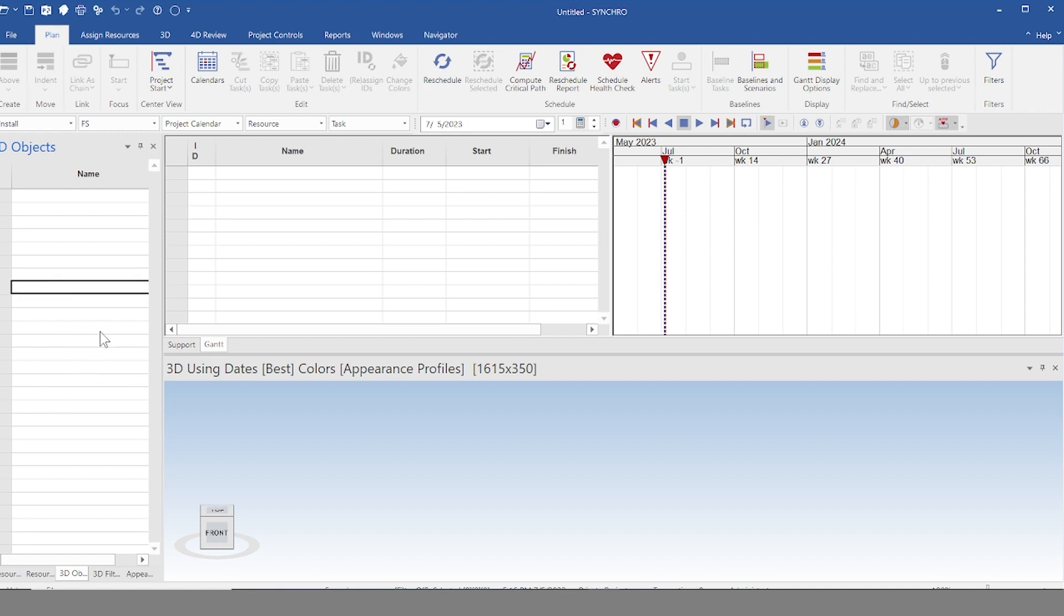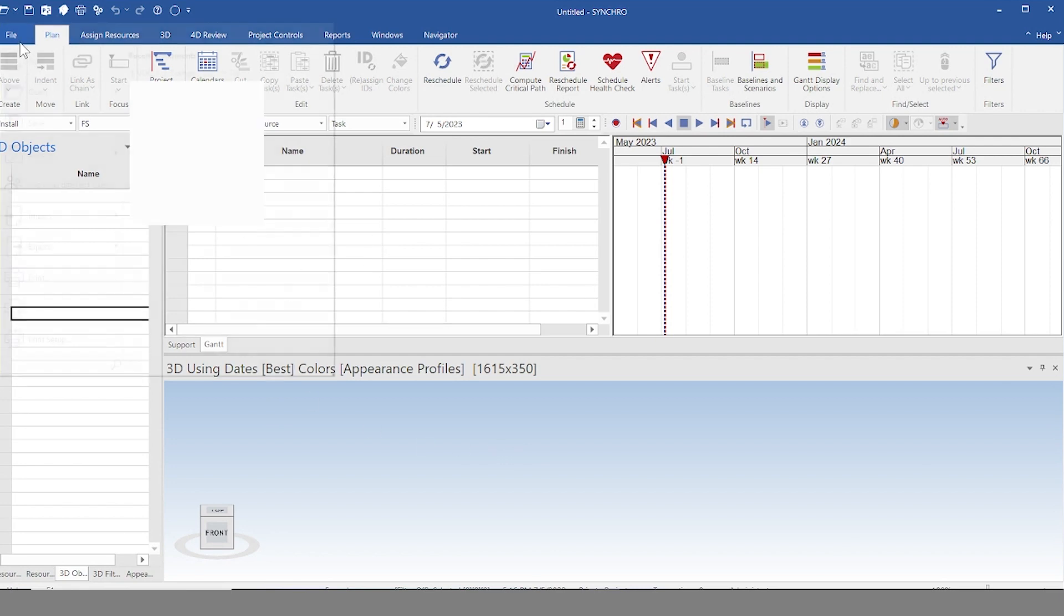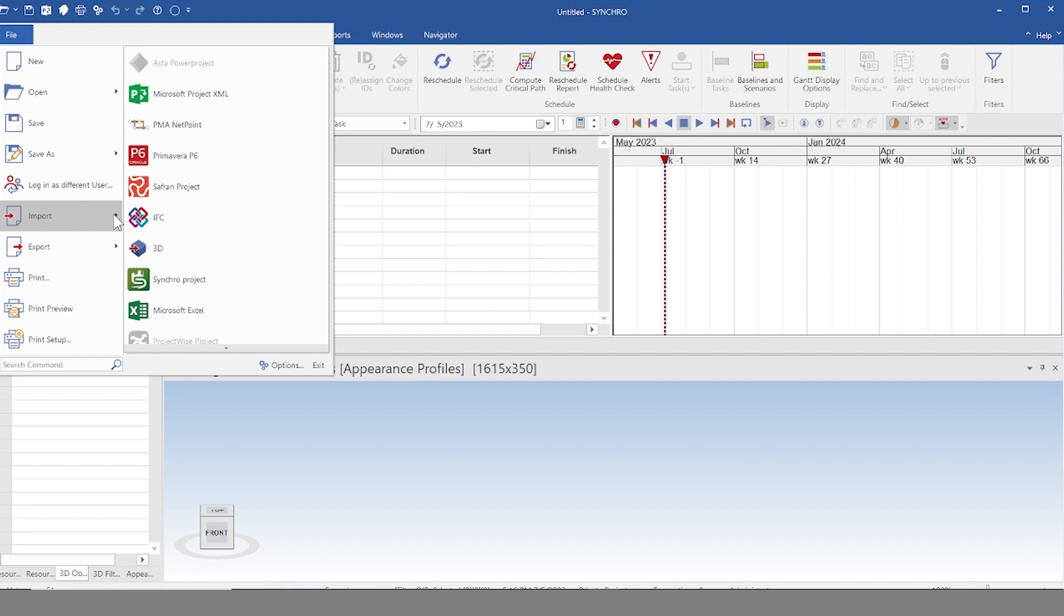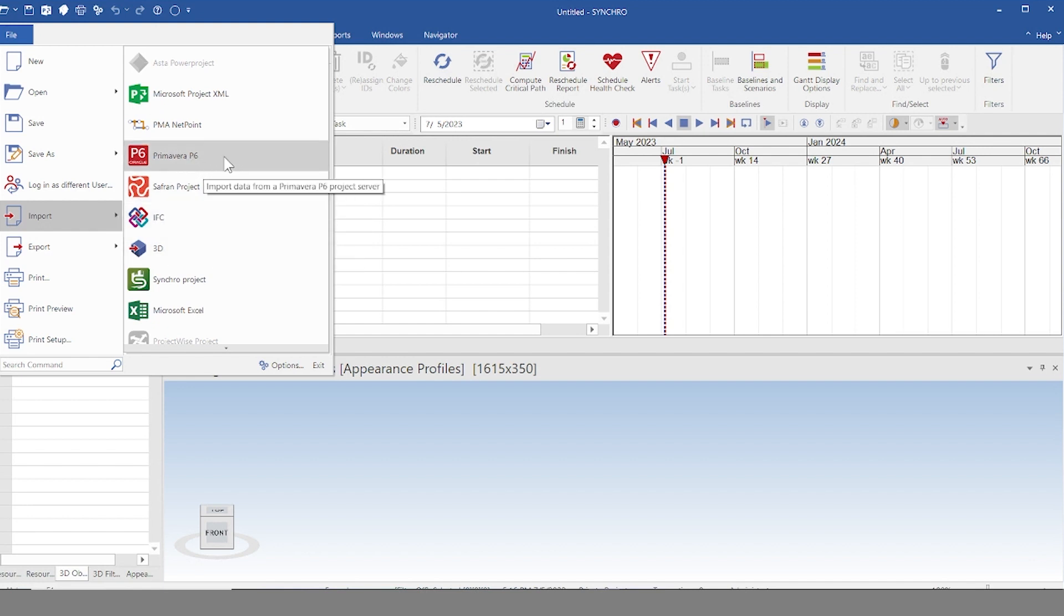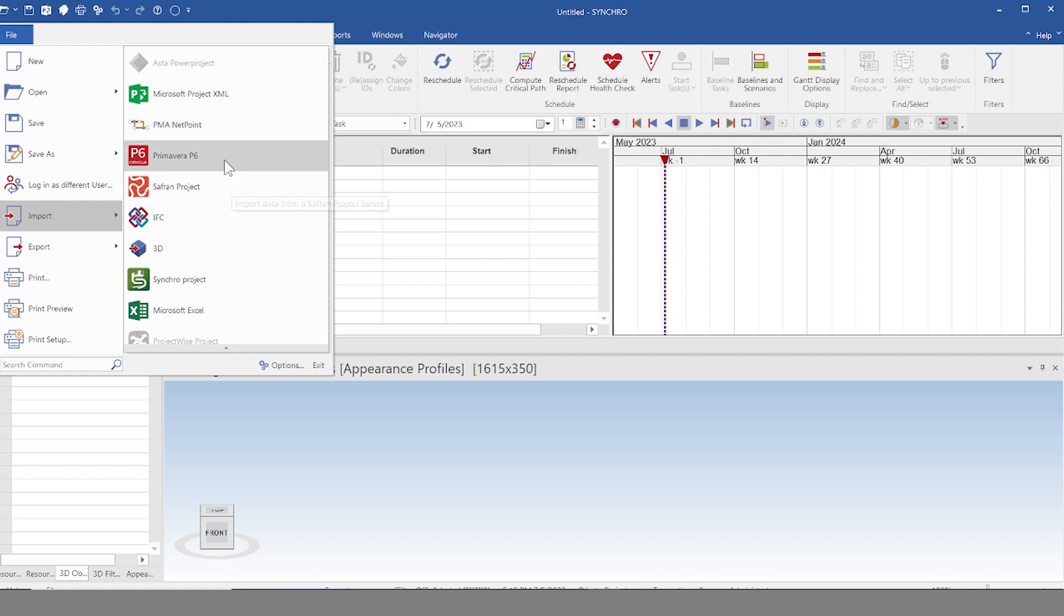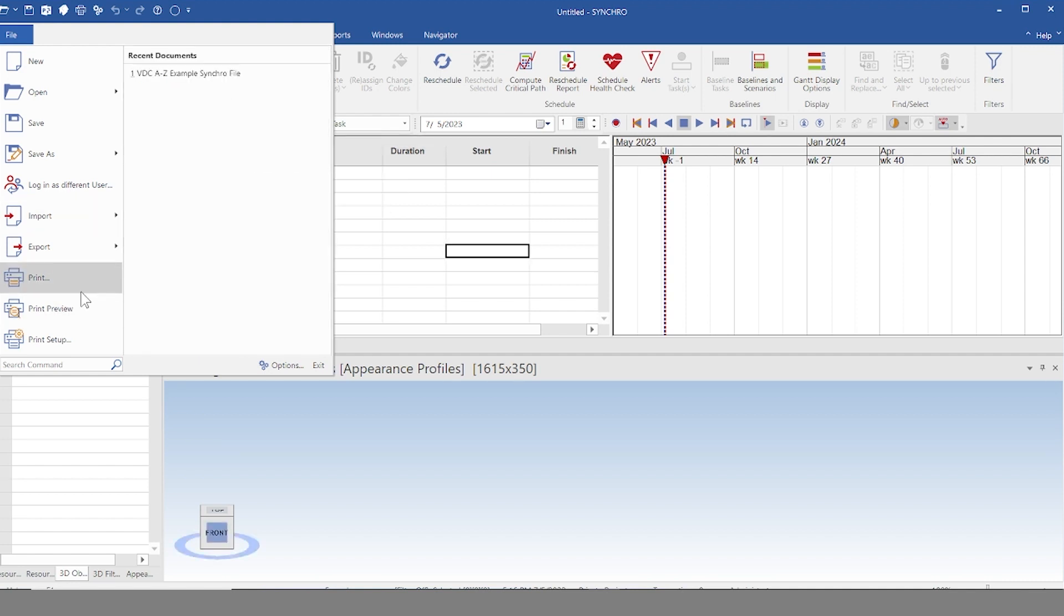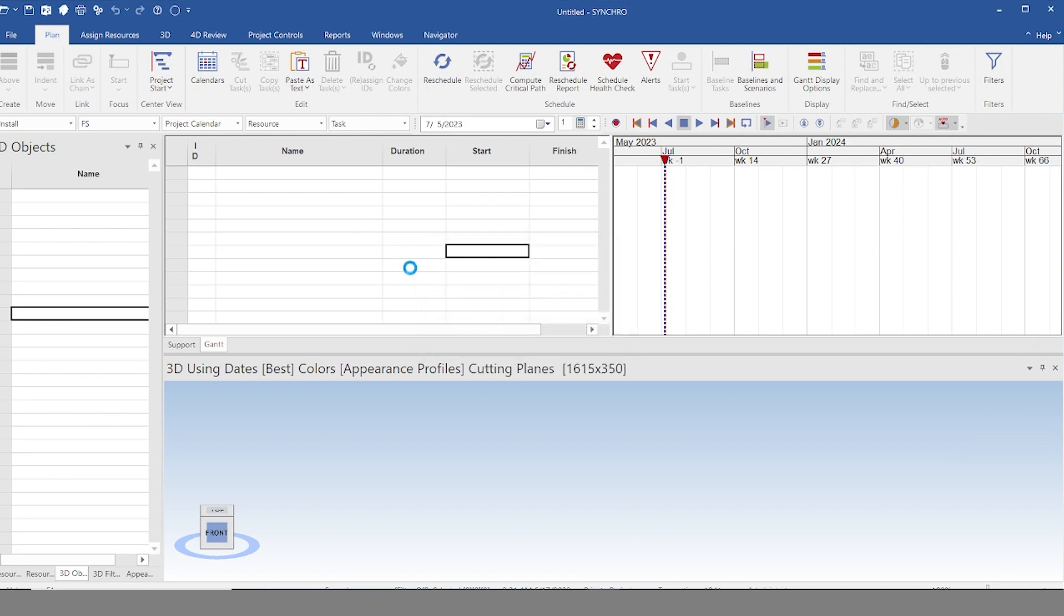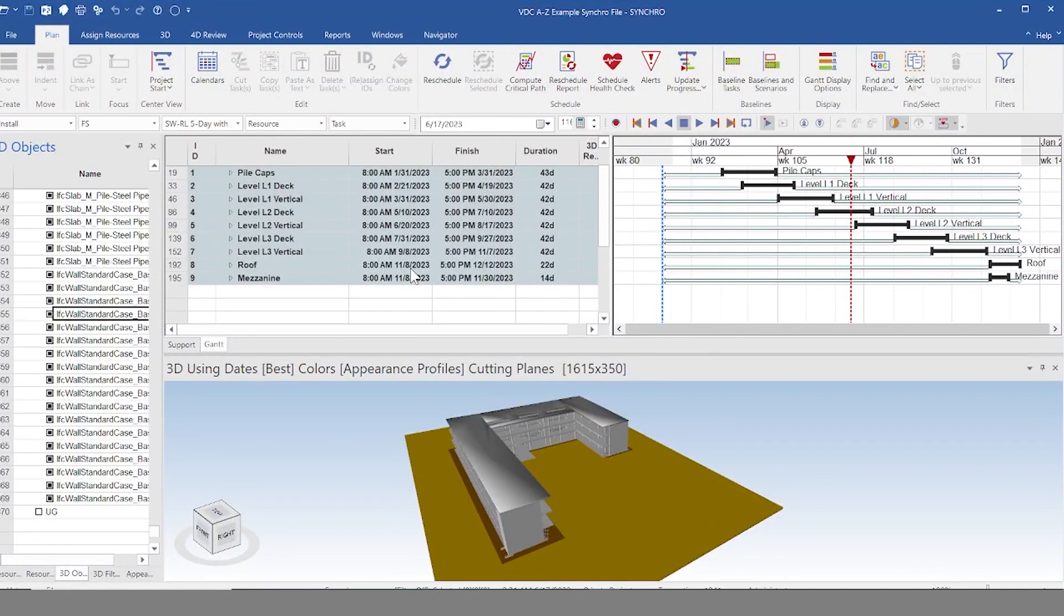So there's two pieces of data that you're going to need in order to connect a model to the schedule. You're going to need a model and you're going to need a schedule. To upload a schedule or a model, you're going to go here to import and you're going to import an IFC or 3D or your schedule from P6 or whatever software you're using. I'm going to go ahead and just load up one that I already prepared.